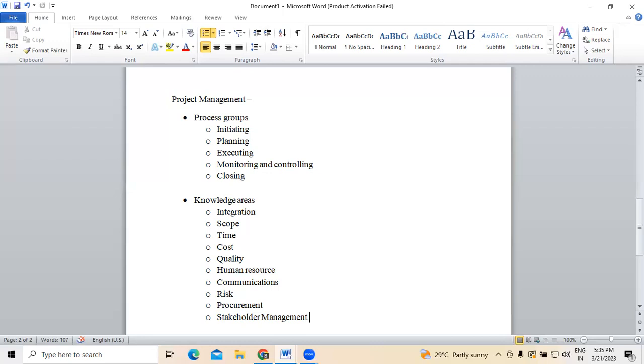Last but not least, when we are talking about the closing phase, we need to confirm whether the work was done with all the requirements which we have taken and finalized. Next, completing the financial closures. At the same time, solicit feedback from the customer about the project, followed by the final performance reporting, and completing the procurement closures, whichever are required.